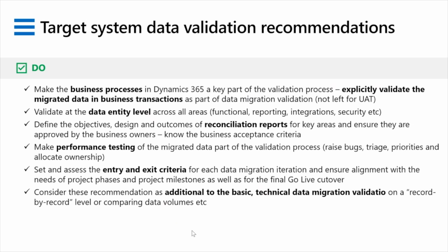And sometimes it means you have to borrow resources from the functional team to say, they're going to conduct the business transactions to make sure that the data landed in the target system is clean and good. But whatever means you do it by, I would strongly encourage you to think of that data migration cycle, or that mock cutover cycle, is not complete until the data is validated to make sure it's fit for purpose in the target system, right?